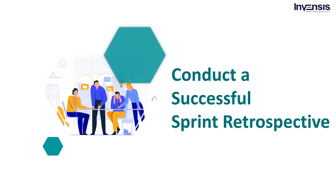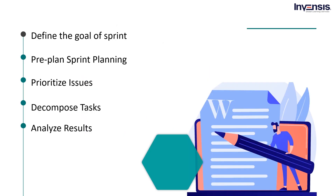With this we are going to address the last part of today's session and discuss tips on how to conduct a successful sprint retrospective. Firstly, you must define the goal of the sprint clearly. It must be specific and measurable based on the discussion that occurred during the sprint retrospective between the team and product owner, and this goal can be well documented. It is extremely important to find the right balance — a goal challenging enough to bring out the best of the team while keeping them engaged and motivated to deliver results. Next, an important tip is to pre-plan the sprint planning. It is advisable to set up a shorter meeting before the actual one, allowing everyone to review the tasks intended for the next sprint and listen to the team's feedback. This way, prioritization, task creation, and estimation will be much easier to complete during the actual meeting.